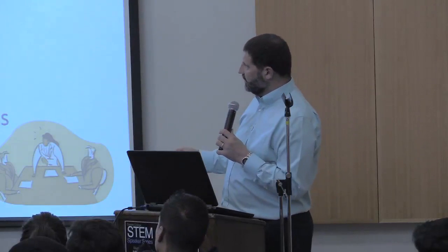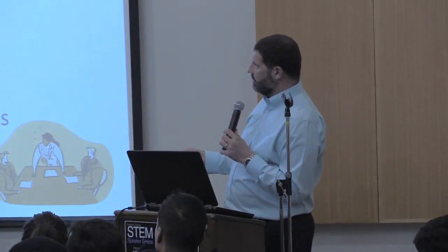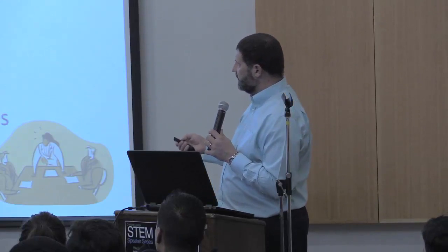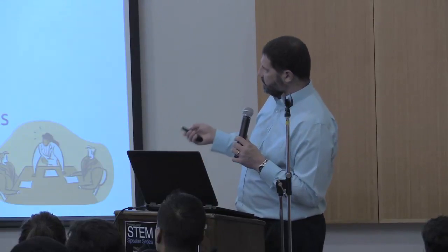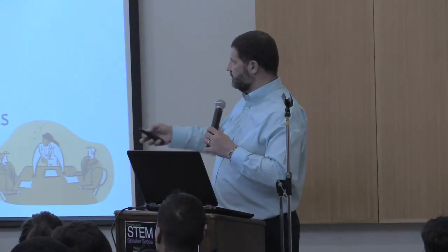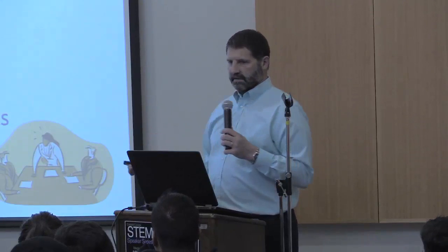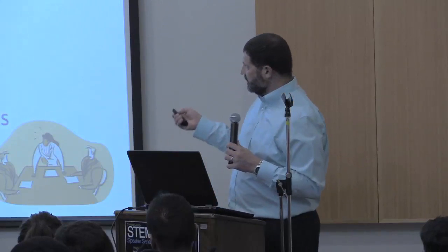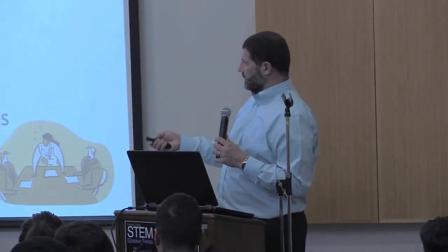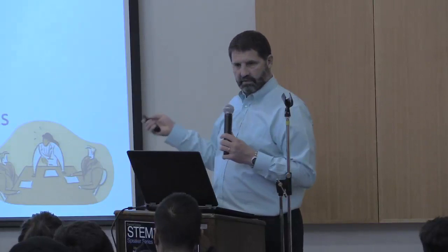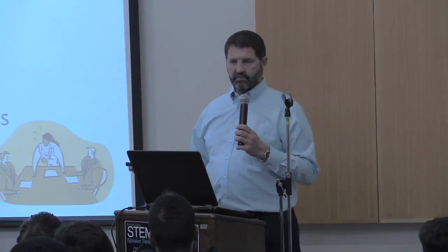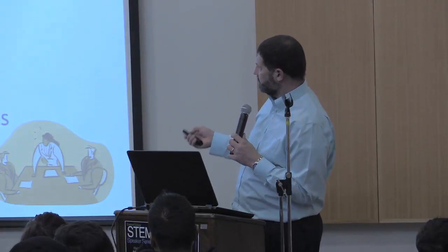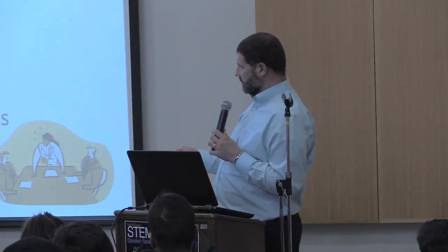And we take an RPN, which is the risk priority number. We look at the probability, and we assign a number to it. And then the severity, and we put this all in a spreadsheet and we say, this could go wrong, it could be that bad, and there's no way we can detect it, or it's easy to detect. And we assign a risk to it, and then we can assign a cost to that and say, well, we want to fix these problems first because they're the worst, and the worst things can happen. And that's one of the tools we use in industry to figure out what we're going to do with regards to process improvement and making things more reliable.